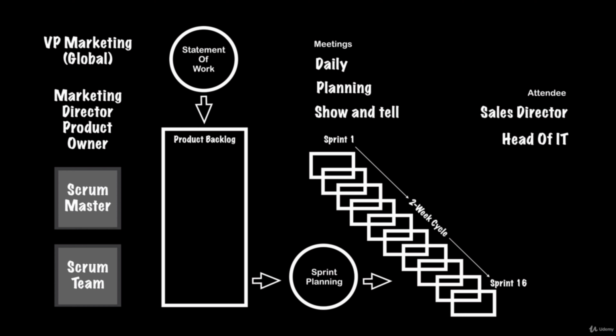So we were always reprioritizing, and that's where the daily meeting was very, very important. For things that were top priority, the marketing director, with information from the client side, would tell us that they've deprioritized that and this is now the priority. So there was that flexibility. We were not very, very rigid. Although we worked in sprints, there was no hard and fast rule that if a task didn't finish in this sprint, you couldn't move it into the second sprint. So that's where Agile in marketing differs from IT.